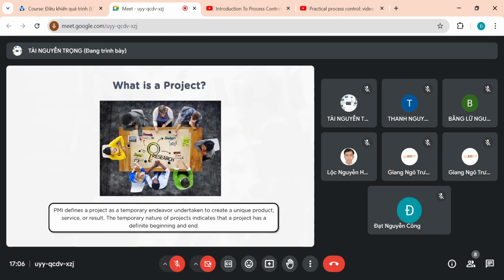Interestingly, in a product life cycle or in a service life cycle, you come across many project life cycles. One project is initiated to introduce a product or service. The next project would be initiated to enhance the capability of a service or a product. The next project, initiated after some time, is to optimize something. Similarly, at the end of the product life cycle, a project is initiated to retire that product or service. So in a given product life cycle, there may be multiple project life cycles.